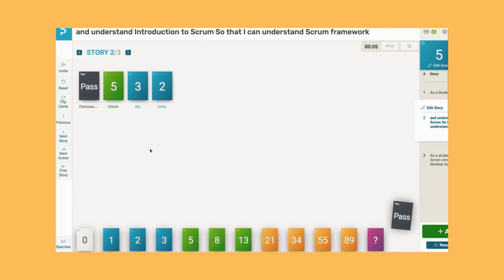3 story points, there is a little bit of unknown. I may need to talk to the team, ask some questions, get some information from them. I may need a screenshot from a team member. There is some unknown that I need to do a little bit of research to find out. So those are what make up the stories. The effort is based on some unknown and the time it will take you to finish it.